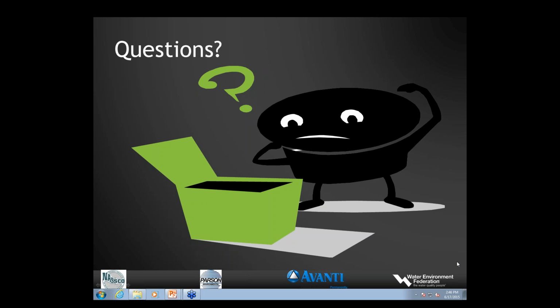Okay. A question that really applied to one of your slides that talked about how much of the system gets tested. Typically, you test 10% of the system, and then you said if 5% of the tested system fails, then there's more testing. Now, did you mean 5% of that 10% or 5% of the entire system? No, 5% of the 10%, and then, of course, that continues. As that 10% is tested and more than 5% of that fails, then you select additional areas to test.